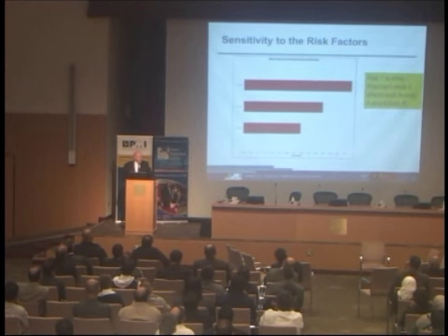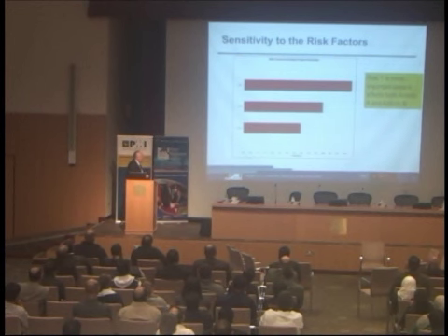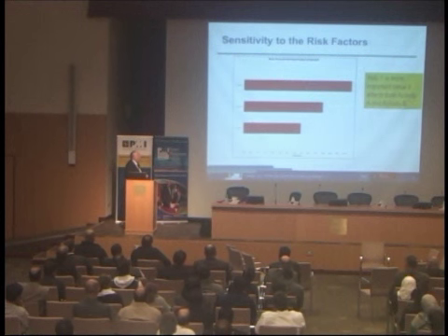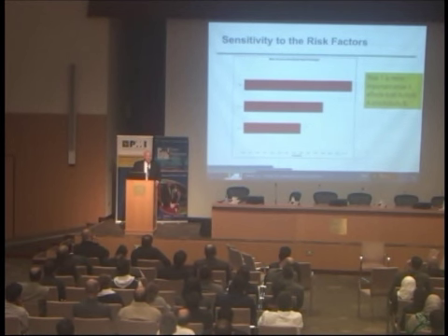Okay, so now all of a sudden, I'm starting to get to the payoff, which is risk mitigation. And you want to mitigate the highest priority risks. And what are the highest priority risks? Well, the risk tornado diagram, where the risks are the argument, not the durations, not the activities, the risks are the arguments down the stub here, starts to tell me which risks are important.